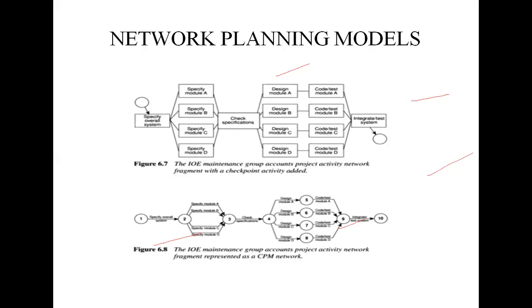Both of these use an activity and arrow approach to visualize the project as a network, where activities are drawn as arrows joining circles, or nodes, which represent the possible start or completion of an activity or set of activities.